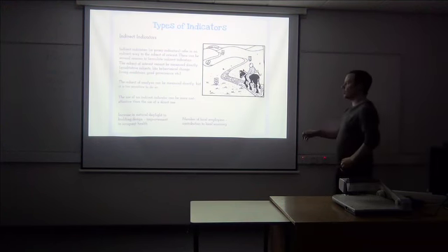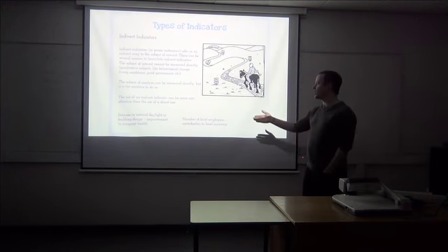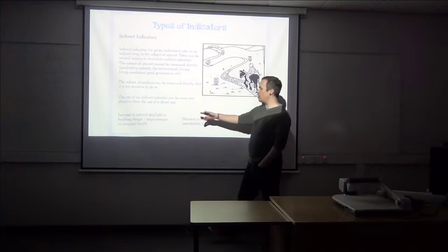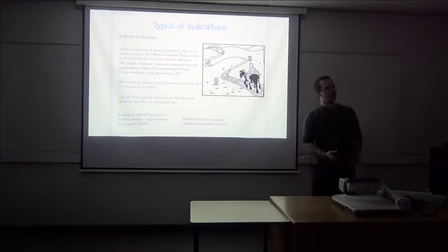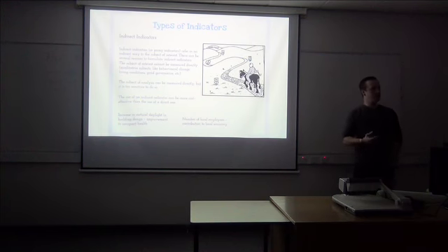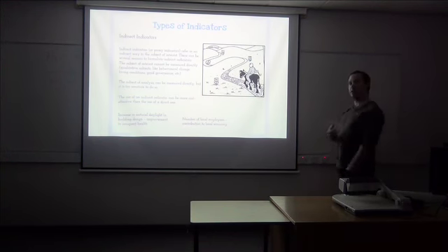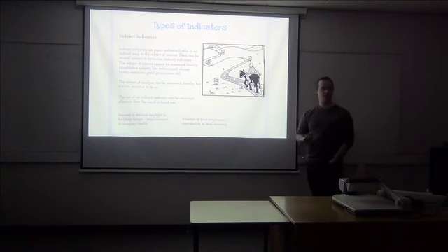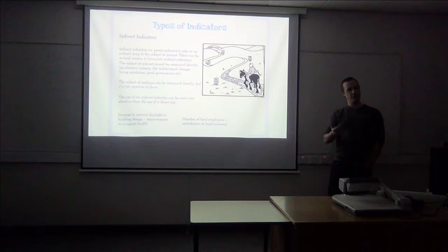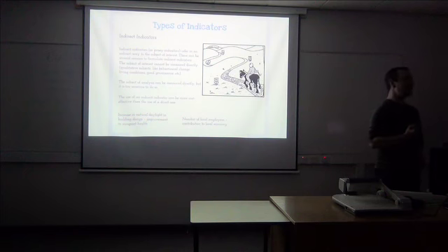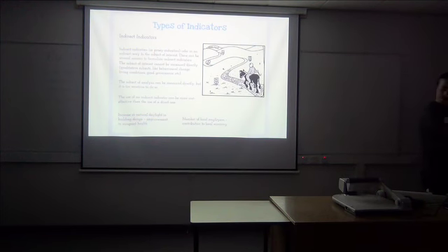So for instance, another thing we do is increasing natural daylight in building design can be a proxy indicator for improvement in health. So it's difficult perhaps to measure occupant health, but we know that the more natural daylight people get, the healthier they are. We know that, we've done a lot of studies on that, it's something that we understand quite well. So we can arguably say that by measuring the amount of natural daylight, we can safely say that's going to improve occupant health to a degree. So they're not ideal, but they do give some indication of what's happening.